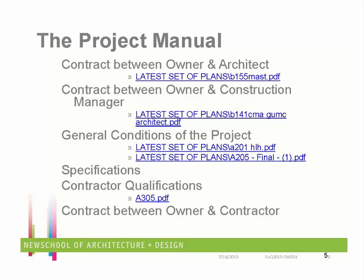So you don't need to bring power to the job site for your carpenters today. It's the general contractor's responsibility to have power available for you. But it's not the general contractor's responsibility to bring power cords to get that power to where you're working. That's your responsibility. It's the owner's responsibility to pay for the utility charges for that power that comes to the job site. Okay? So that I don't say, well, I'm going to put $1 million in for power. In the conditions of the contract, it defines how the general conditions work. Who's going to pay for office space? Who's going to have the right to use it? Where are documents filed? All of that kind of information is in there.